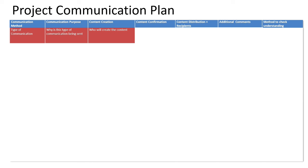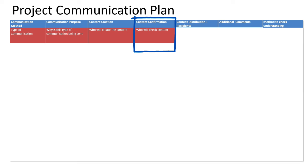You're also going to identify content creation — who's going to create the content. A lot of times communication falls on the shoulders of the project manager, but sometimes it has to be other individuals, so this is where you lay that out. Content confirmation is about who's going to check it — how do you know that the information going out is correct. For communication staying within the project team, confirmation may not matter, but if it's being disseminated externally, you want to check it against acceptability, communication standards, and company standards.